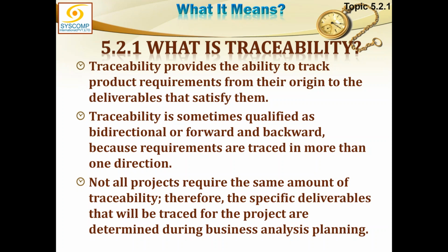The source has given us the requirement. That requirement has been translated into features and functions, and these are to be achieved through certain steps and activities, and ultimately that deliverable will be achieved. So we have to be watchful of the whole trace, right from the source till the deliverable and the satisfaction of the customer.